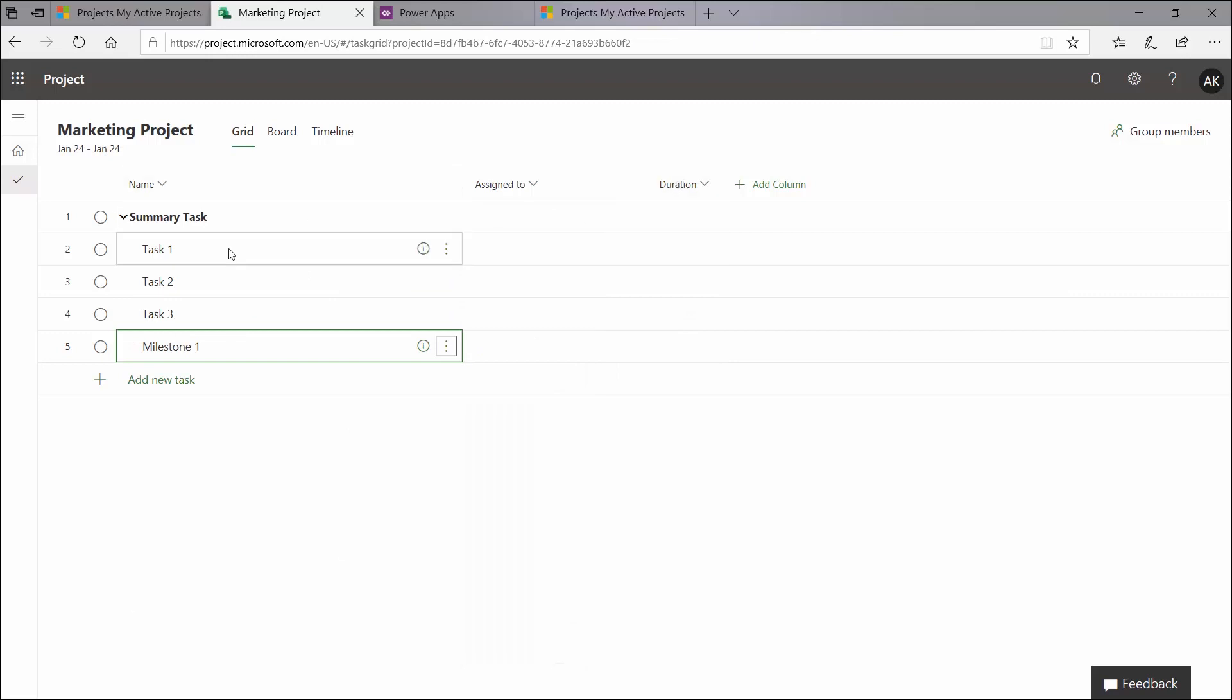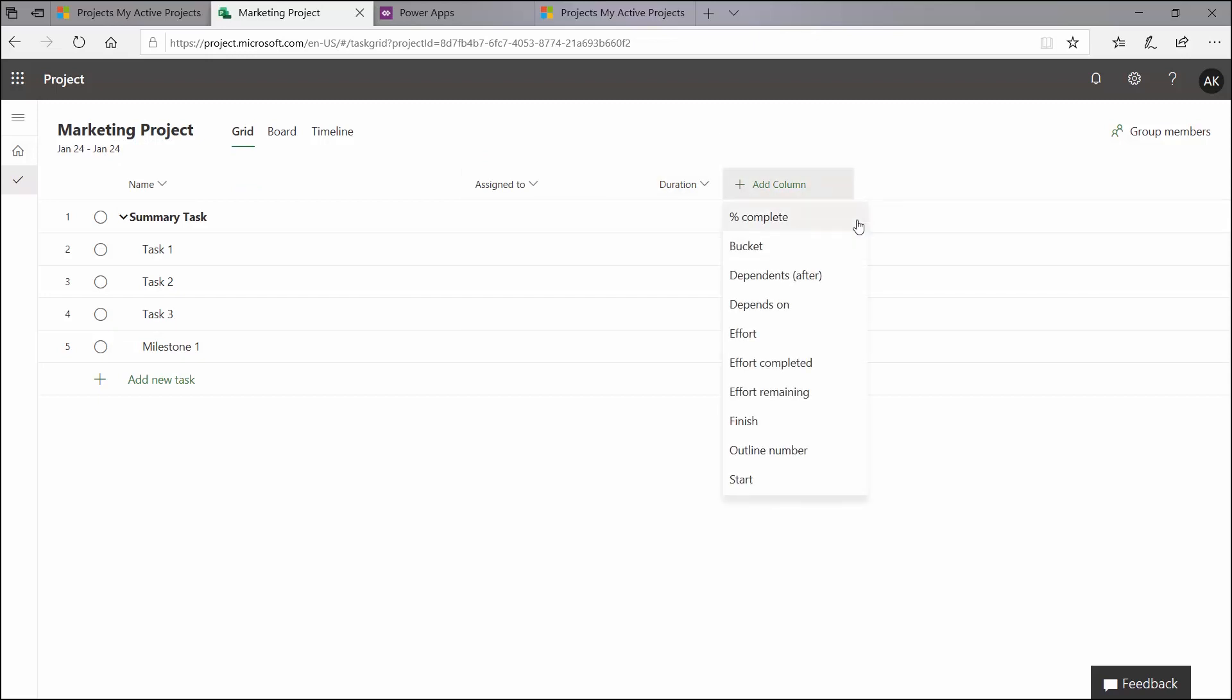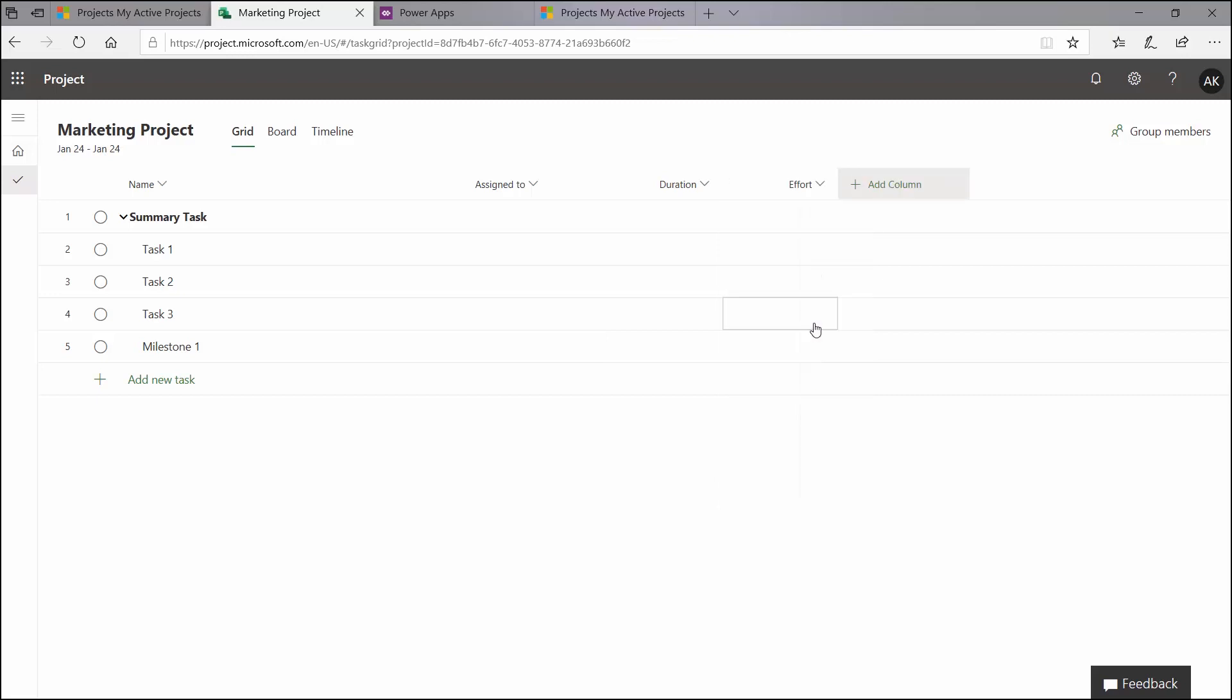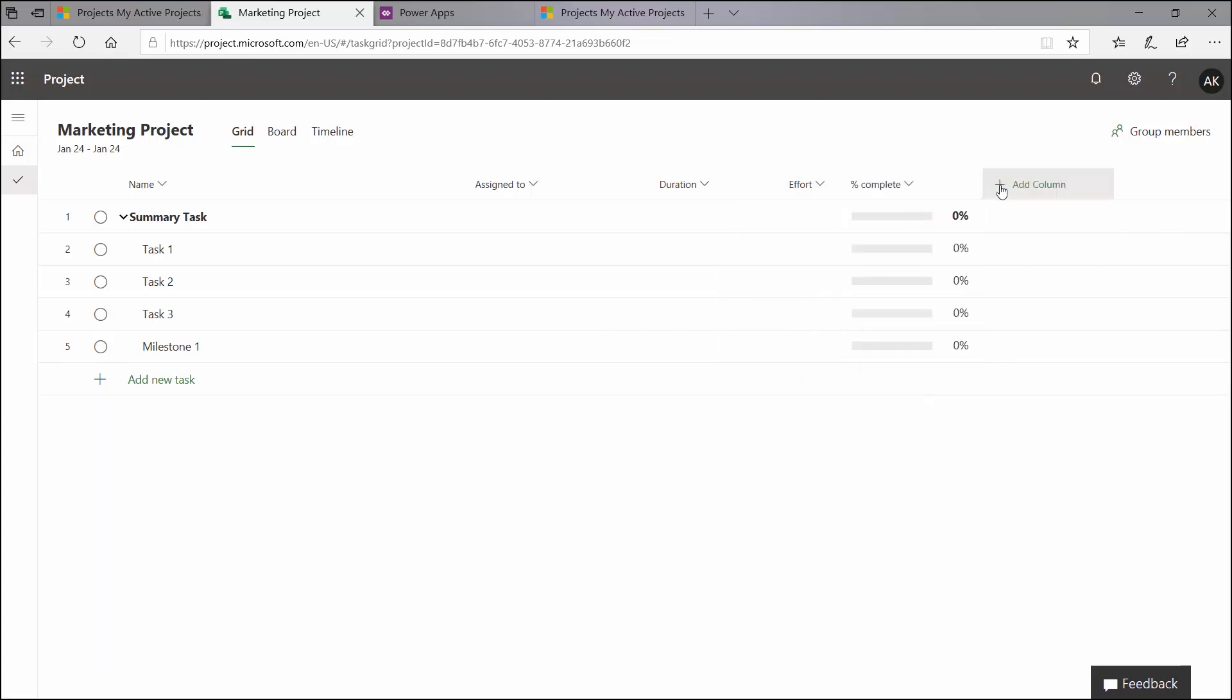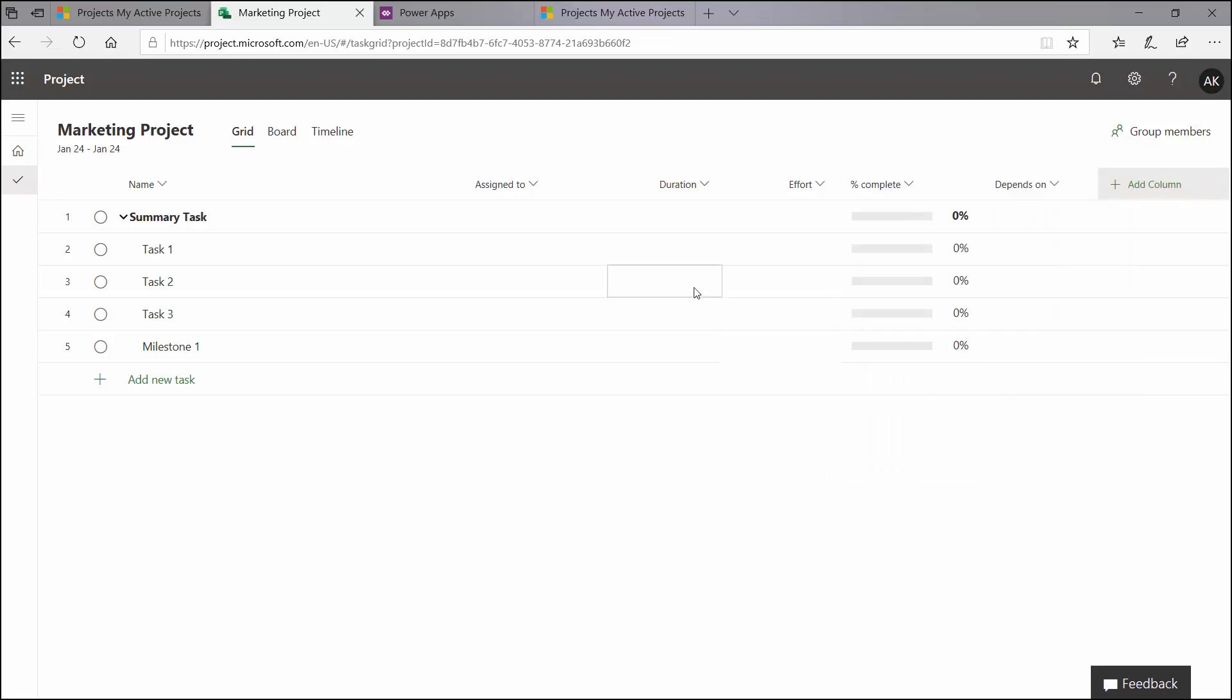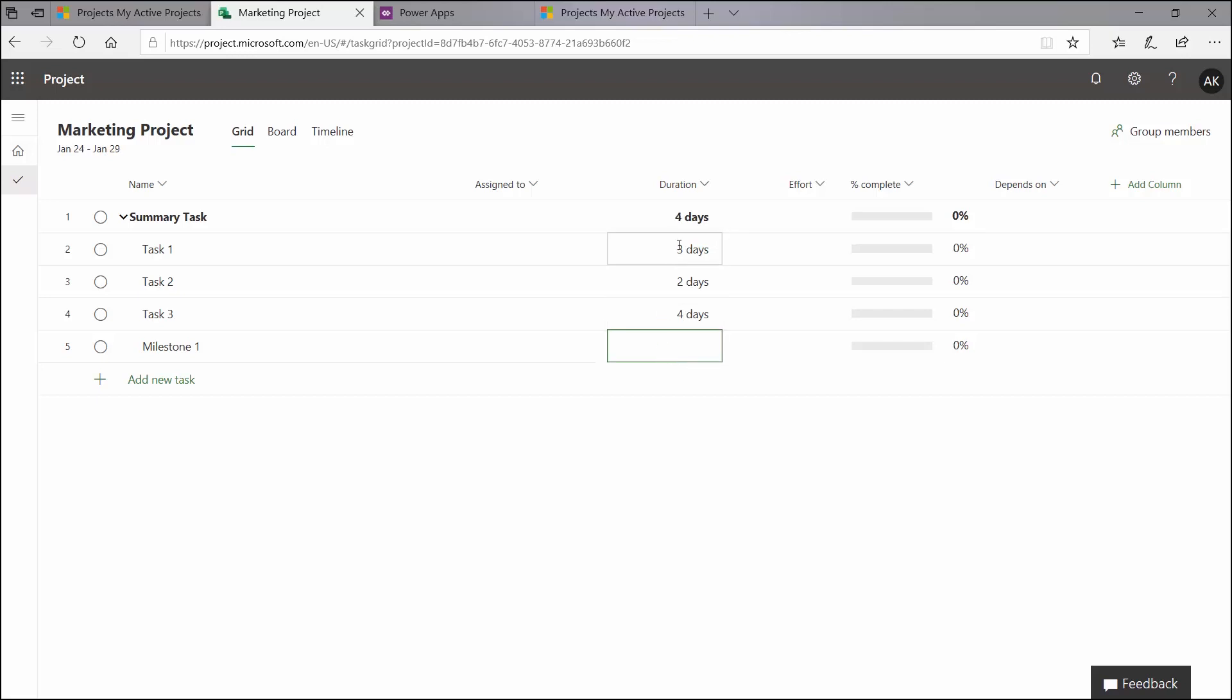So here, by default, it lets you see your task name, who the task is assigned to, and the duration. But there is an add column here. And here you can see you can see the percent complete, the bucket, the dependencies, the effort, or the work as it was formally known, the finish date, the outline number, and the start date for these tasks. So I'm going to add in a couple of additional fields, such as effort, percent complete, and my depends on column. I'm going to add in some durations for my tasks. I'm going to add a three-day duration for task one, two days for that, and a four-day for that one. So since my tasks are currently not linked in any kind of finish-start relationship, the duration here is just my longest duration, which is four days, because it assumes that all of these tasks are going to take place starting at the same time.